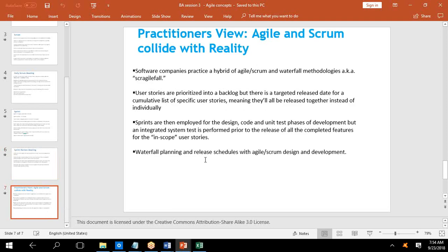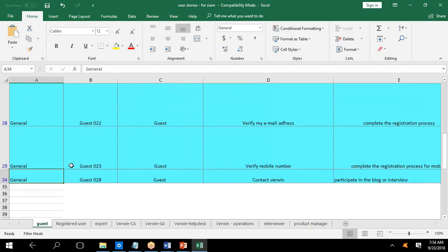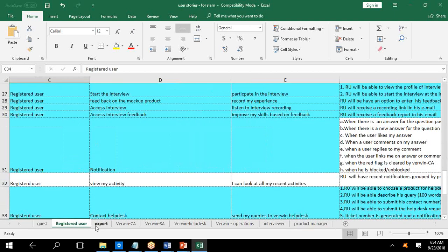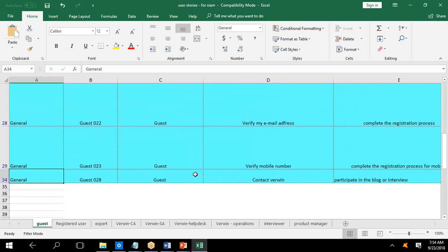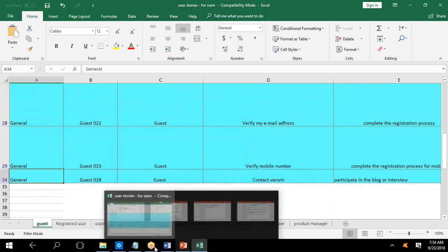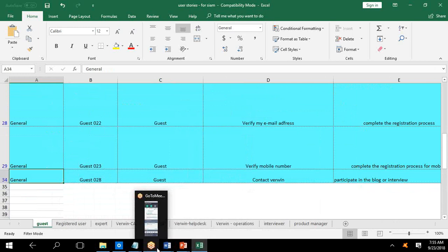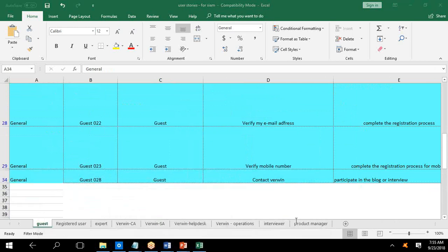Now, in reality, what happens is you need to understand this. In the real world, Agile and Scrum may not be used just like that. They'll be using a mix of models. So they may say, even in this project, for requirements I sat down and wrote most of it completely, which means for requirements I followed a waterfall model, but from design and implementation it is agile. So that's reality. In the real world, you'll use a hybrid model.